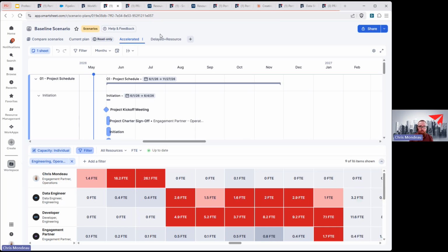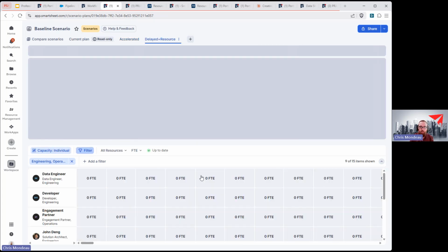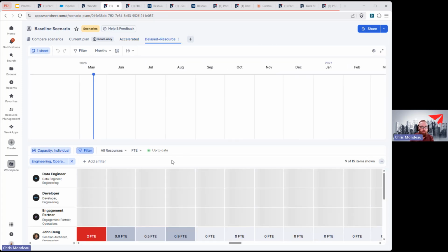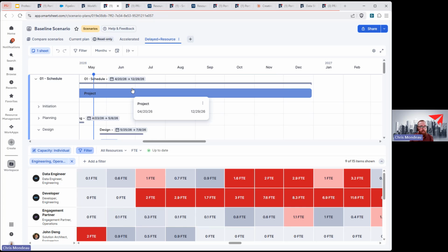But it can allow you to start to basically see how many projects you might have in an analysis for resourcing beyond just those placeholders, and then run maybe a scenario of maybe it's accelerated. Maybe I need to shift that project work down from project to project. So you're able to create new scenarios, and that scenario can include 1 or up to 5 projects specifically, and give you this split view where you're viewing the high level project schedule.